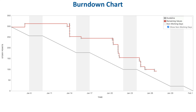So far we have only looked at burndown charts for completed sprints, and you might wonder how we can use a burndown chart to foresee problems early while the sprint is still going and we can still do something to rectify problems. Here is the burndown chart for the third sprint, while the sprint was still in progress. You can see that the red line does not go all the way to the sprint end, but it goes up to the current day when this snapshot was taken, allowing us to check daily how well the sprint is doing. In this case, we can see that the red line has been above the gray line since the beginning of the sprint, indicating that the team is running behind and has to do something to catch up.